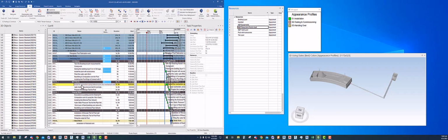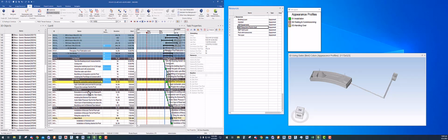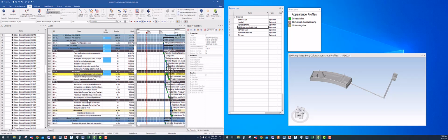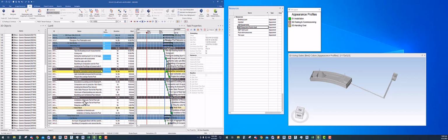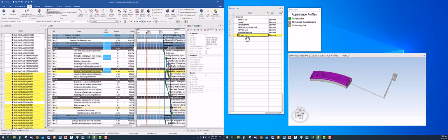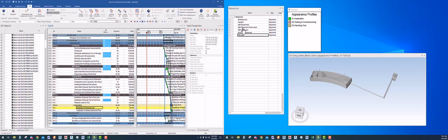Under the MEP works, the categories are already there. Then extended work and final work: installation of mosaic tile for pool wall, installation of mosaic tile for pool floor. Now we created one tile layer which includes wall and floors. So I'll assign this to the latter one, which is the floor. Then installation of handrail. I'll select handrail and I will put it here.